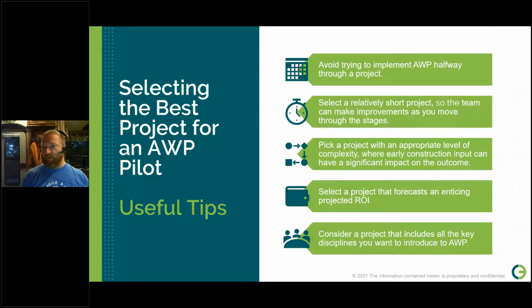impact on the outcome. If you pick a project where you're installing a new e-house and it's a lump sum bid to a single contractor and it takes 2 days to install it in the field, you're not going to get a lot of value out of that.